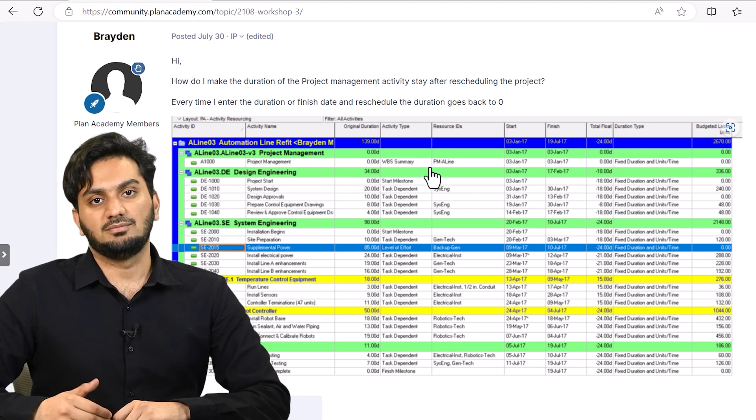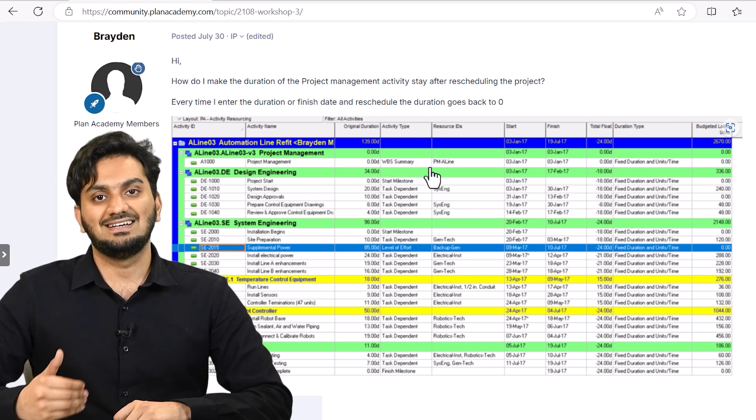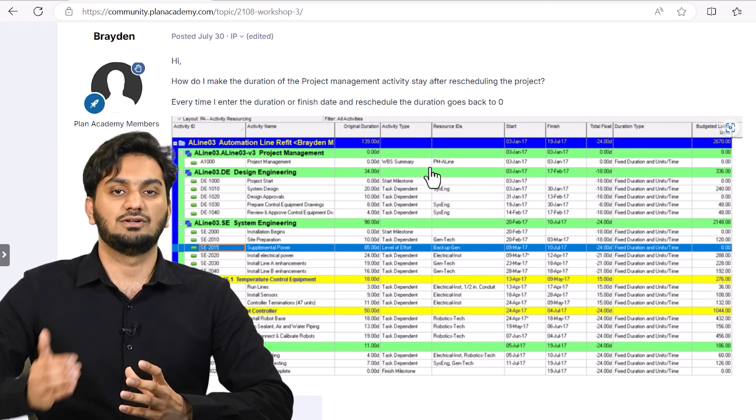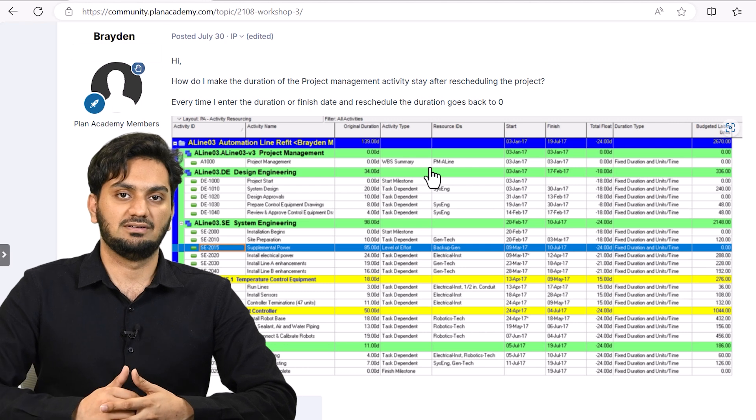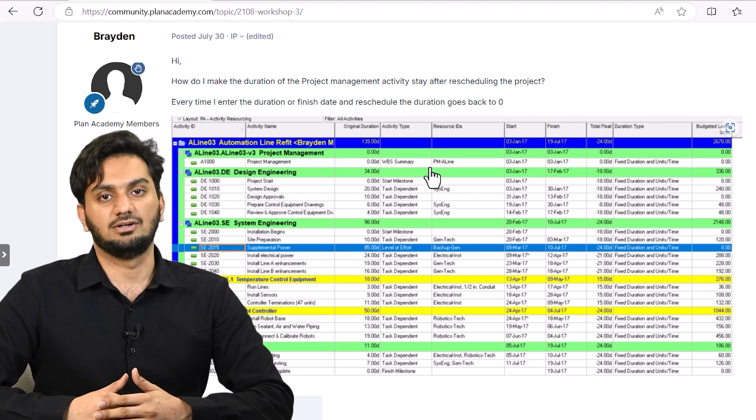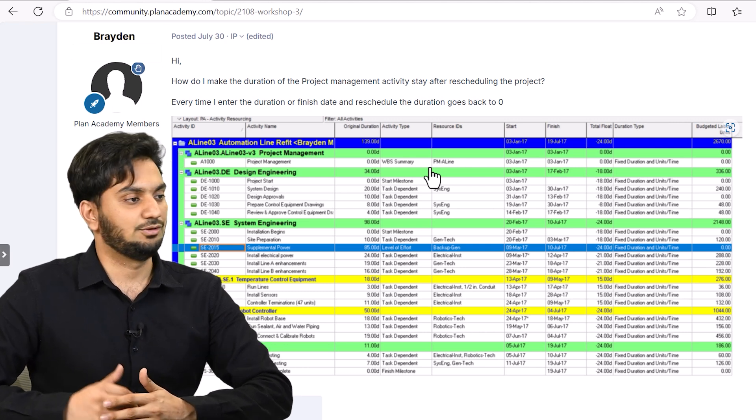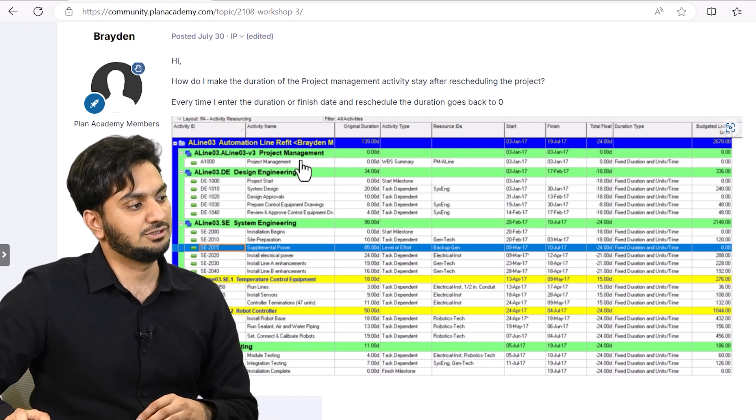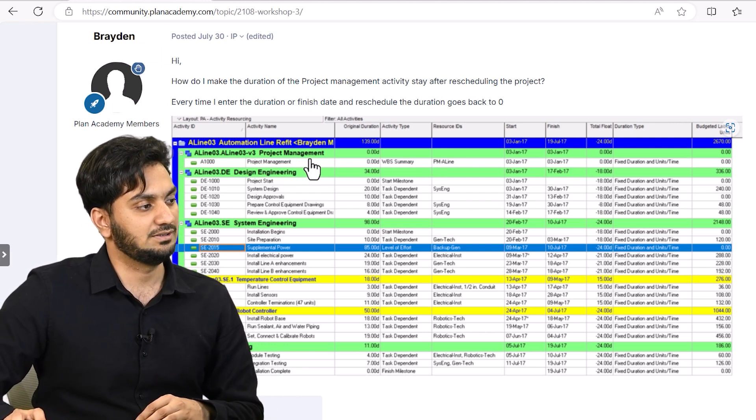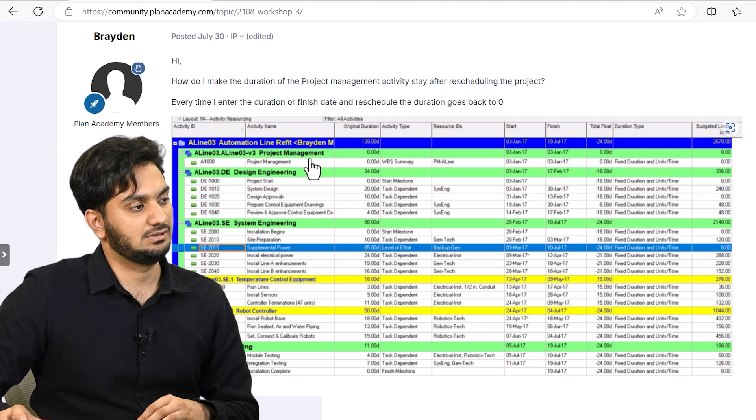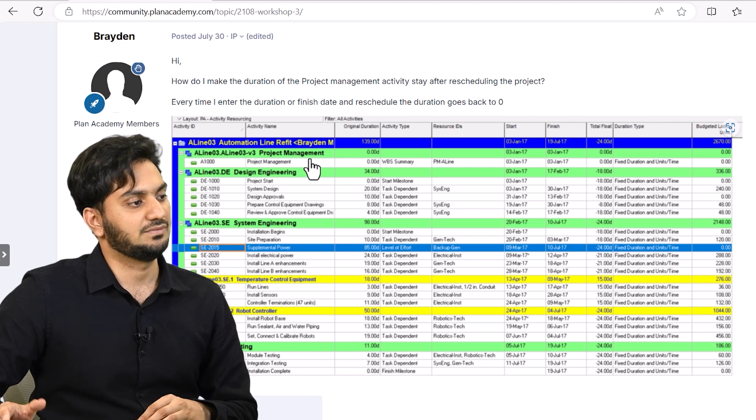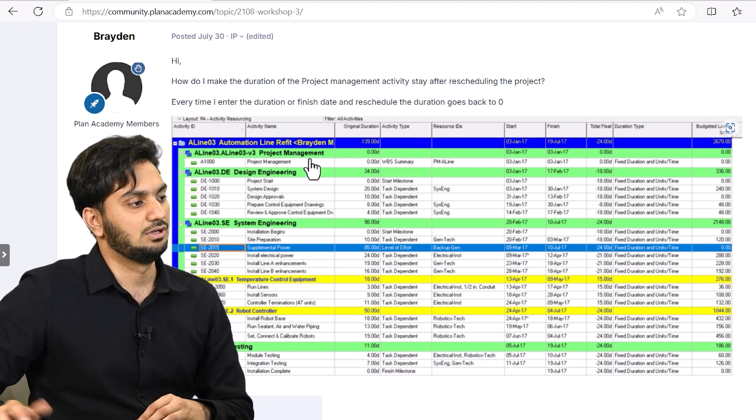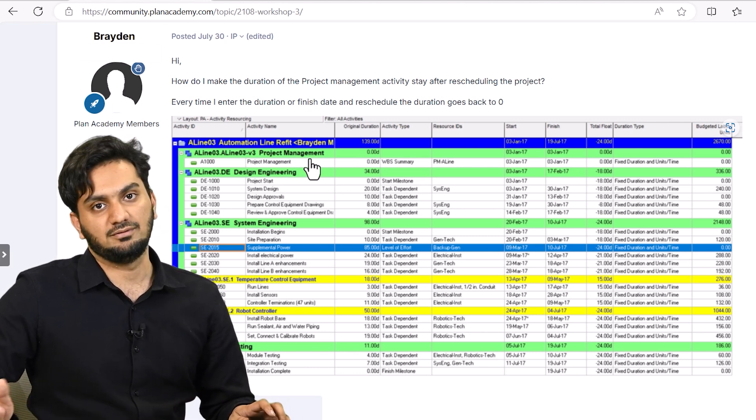WBS summary cumulates the duration for its WBS whenever you schedule it. So here, you can see, under the project management WBS, we don't have any other activity. That's why it is cumulating to zero. So let's see how you can fix it.